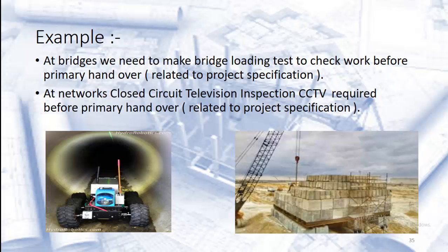We can see here steel beams, concrete blocks, cranes and others, and also gauges and monitors to review the results. After the test is finished, we take the results to the lab to check them, make graphs and calculation sheets, and we submit a full test report to the consultant.